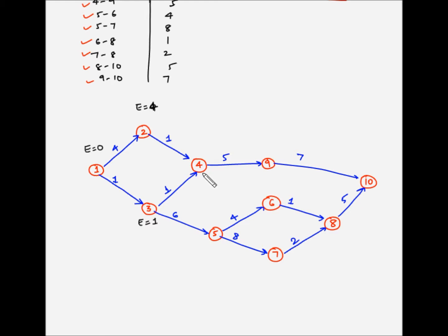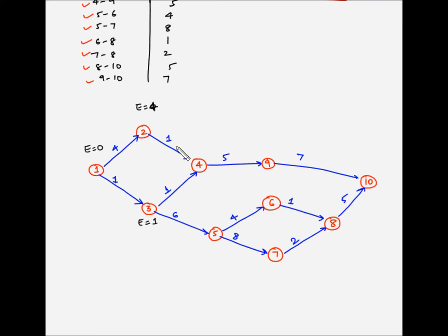For event number 4, the earliest it can occur is when both activities 2-4 and 3-4 have been completed. Activity 2-4 is completed after 4 plus 1 equals 5 weeks, while activity 3-4 is completed after 1 plus 1 equals 2 weeks. Until both activities have been completed, event 4 cannot occur, so earliest occurrence equals 5. For event number 5, the earliest occurrence is when activity 3-5 has been completed: 1 plus 6 equals 7 weeks. So earliest occurrence is 7.